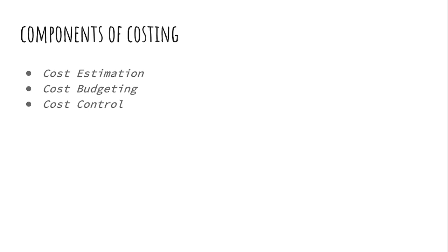Tools you can use in this are the cost change control system, performance measurement analysis, forecasting, performance reviews, and project management software. And the outputs after you've done your cost control are the cost estimates, the cost baseline updates, performance measurements, forecasted completion, requested changes, and recommended corrective actions.